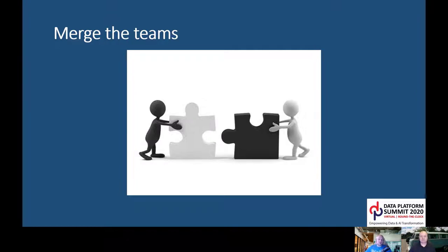In addition, our manager has decided that the development team lead will become the Scrum Master and the operations team lead will be the product owner. Now, for those of you who don't know, a product owner is responsible for translating business needs into workable backlog items for Scrum sprints, which means they must speak to stakeholders at various levels within the business. In addition, they are ultimately responsible for prioritizing those items, even though they may get input about those priorities from various stakeholders. And the Scrum Master's role is to empower the team to do those backlog items by encouraging how they work and removing any impediments if they occur.